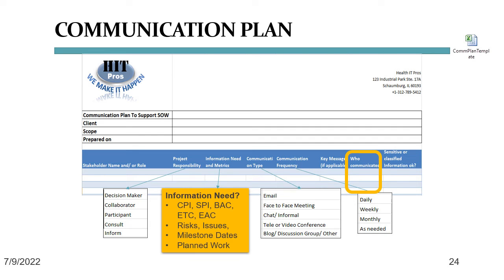Because it wasn't I, the project manager, who ended up sending these messages. It was the director of internal change management. Why? Because she had been with the company for over 10 years and knew almost everybody personally, and everybody knew and really liked her. And as you have learned before in this course, the best person to communicate is not always you. On to the last column.